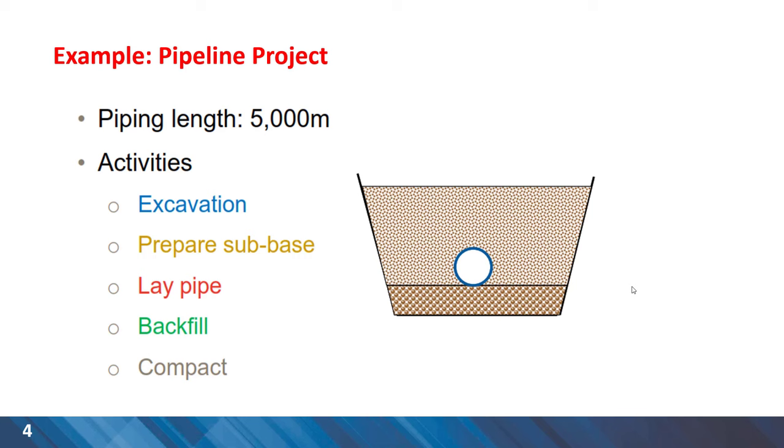Logically we need to have excavation completed before preparing the subbase and the subbase should be completed after that pipes are laid. But we don't need to consider this for the whole length of the project.